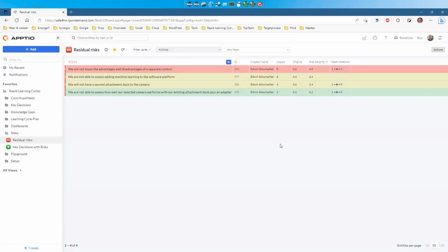And then another piece is in the next version of the Rapid Learning Cycles framework, the one that we're releasing this fall, we'll have a little bit more emphasis on the risks piece, because that's been really useful for helping people get the right set of key decisions. And so in the new version of the kickoff event flow, there's even a step for defining risks, NUDs, new unique difficult items, and uncertainties.